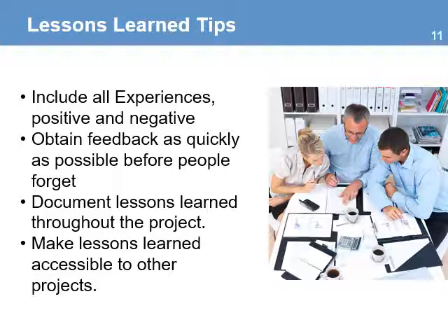Obtain feedback as quickly as possible before people forget. Don't wait too long to conduct a session. Try to get it in the early stages of the closing phase while your team is still available and they have the time to participate.